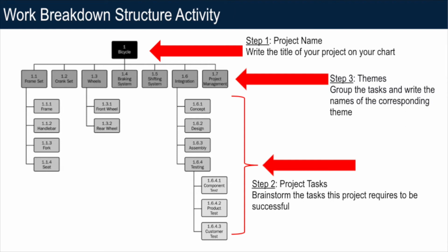That's step two. Then step three, we go back to that middle section, and we're going to create some affinity groups out of all your different sticky notes. So for example, back to the graduation example, you might have a whole category around, let's say, flowers. You want flowers for your marshals. You want flowers for your dignitaries who are speaking. You need flowers for in front of the podium. And for those of you who have done graduation ceremony planning before, you know that these are the kinds of little things that you can't leave out. So you could have a whole group around just flowers and list all of the tasks below in your stickies. And in thinking about it in this 3-step process, that's how you can very quickly create a work breakdown structure.